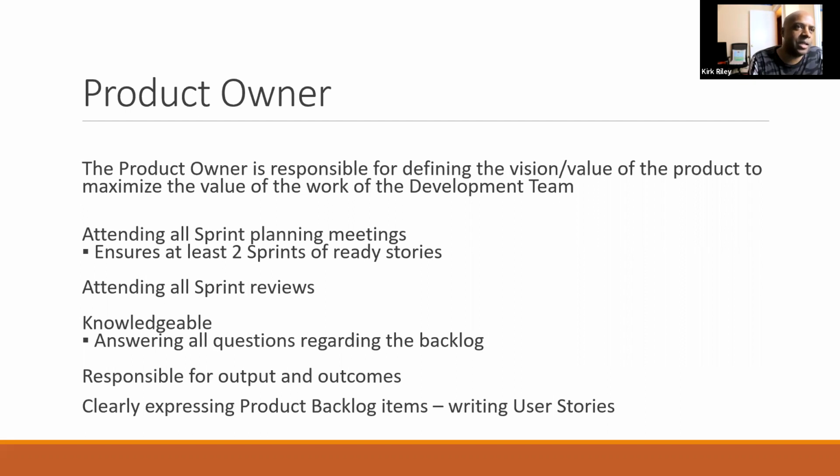And once they work on it, I do a demo amongst all the POs. So we all do a PO demo and demonstrate how that particular feature works. And then I accept it and it gets placed into production. Then at the next iteration, we spend 2 weeks working on a particular feature. Once that feature is developed, I go through the same process again. Is that the question you're asking?